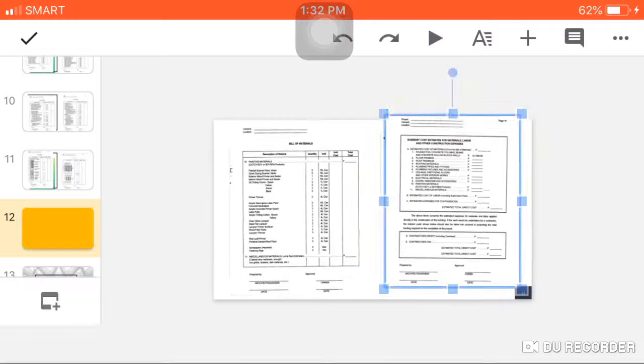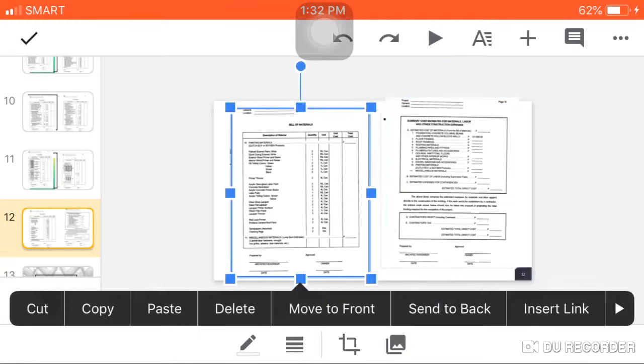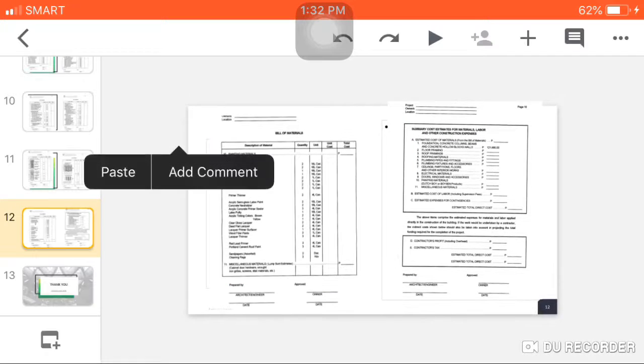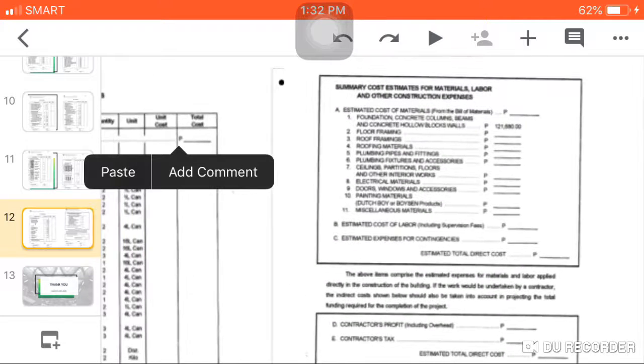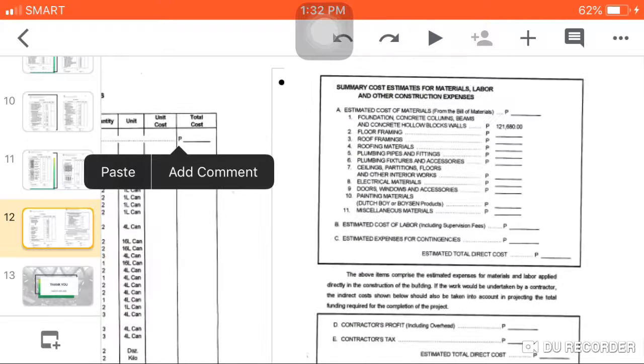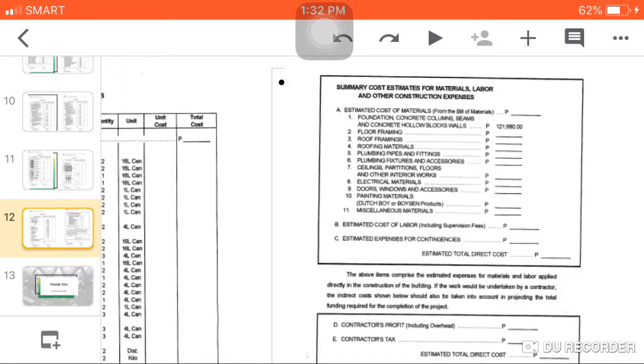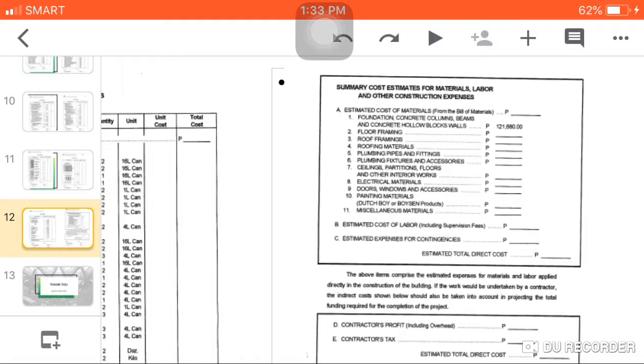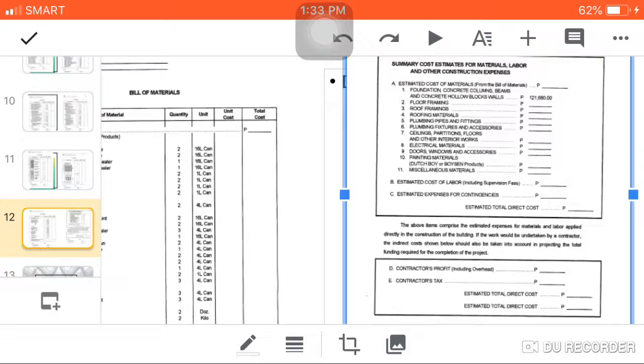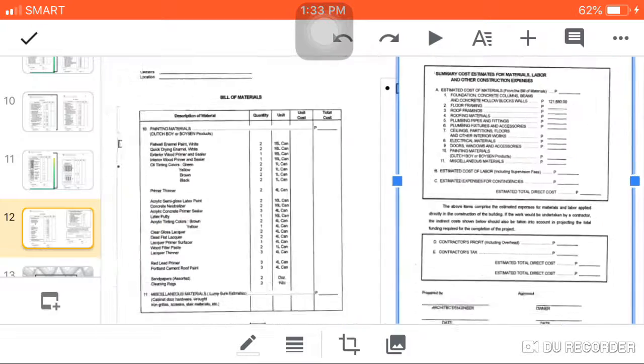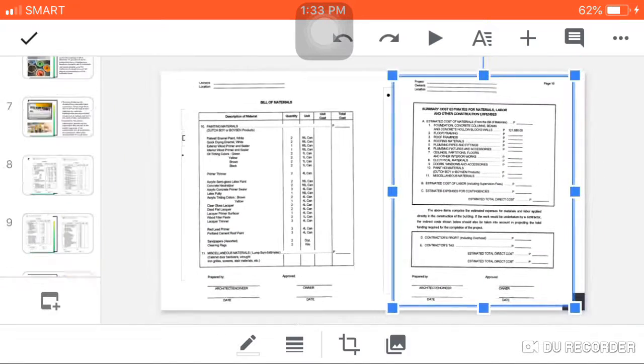For the last page in bill of materials, we have the summary cost estimates for materials, labor, and other construction expenses. It is divided into different parts: part 1 is foundation, part 2 floor framing, 3 roof framing, 4 roofing materials, plumbing, plumbing fixtures, electrical materials, doors, windows and accessories, painting materials. Then is the estimated cost of labor, estimated expenses for contingencies, and last is the contractor's profit and the contractor's tax.